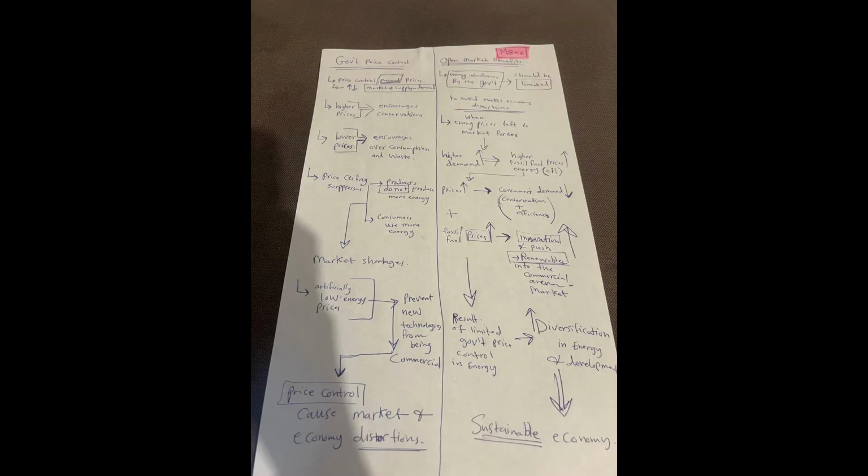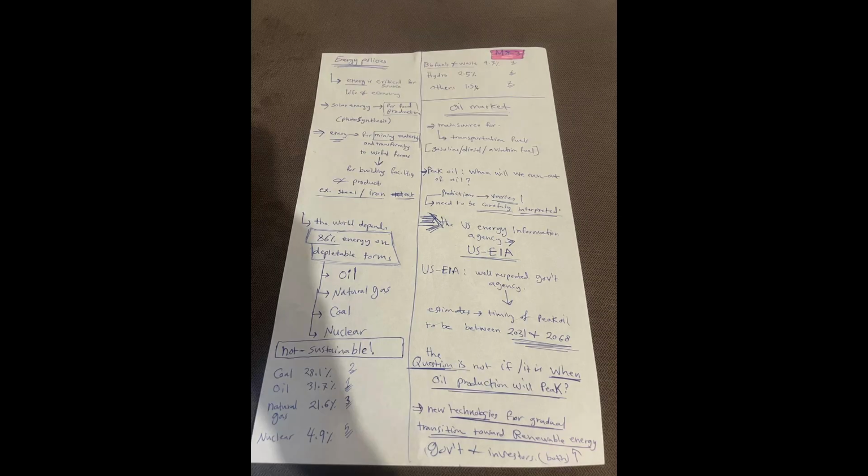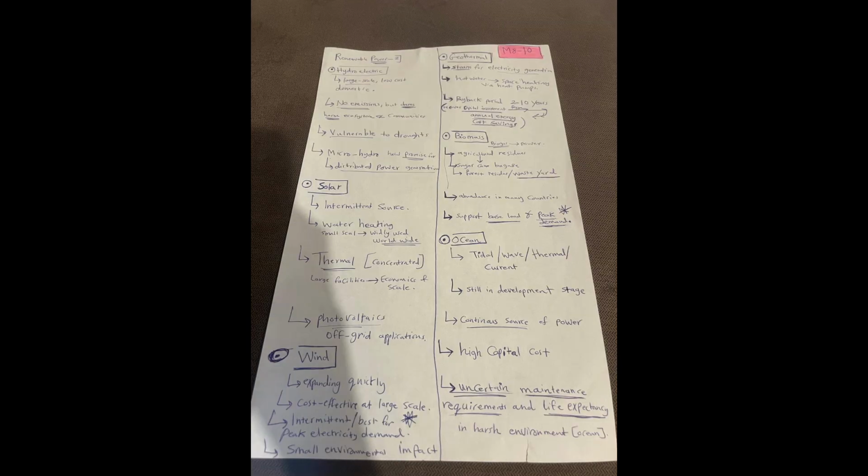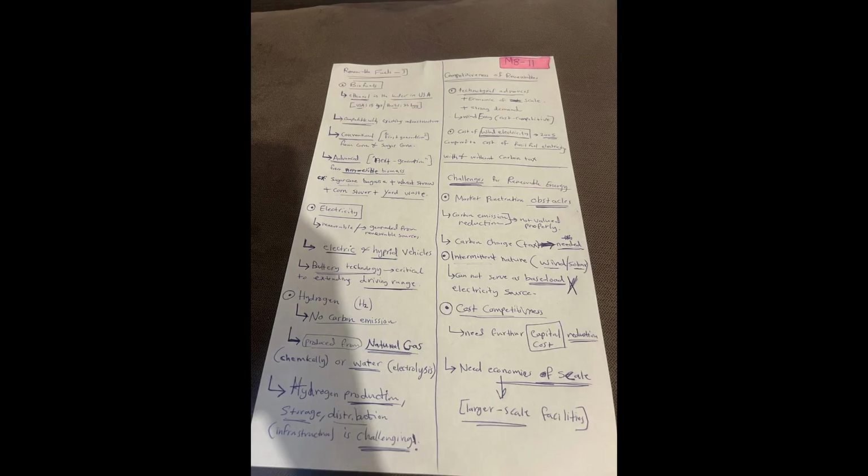Okay. And surety bonds. They're different from insurance. Yes, important distinction. A surety bond isn't insurance. It's a three-party guarantee. You have the contractor, the principal, the owner SPV, the obligee, and the surety company. And the surety guarantees the contractor's performance. In specific ways. Bid bonds guarantee they'll sign the contract if they win the bid. Performance bonds guarantee they'll complete the work. Payment bonds guarantee they'll pay subcontractors and suppliers. Retention bonds cover defects after completion.